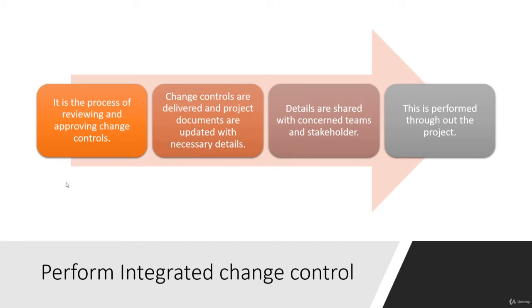And every documented change request will be reviewed and approved. When I say approved, a decision will be taken on that. So the change control board can also decide to defer the change request, because it could be any reason. They may not have enough money at that stage, and there may not be enough other resources, and they may simply decline, saying that it is not worth it or it is not important. So all change requests are not approved.